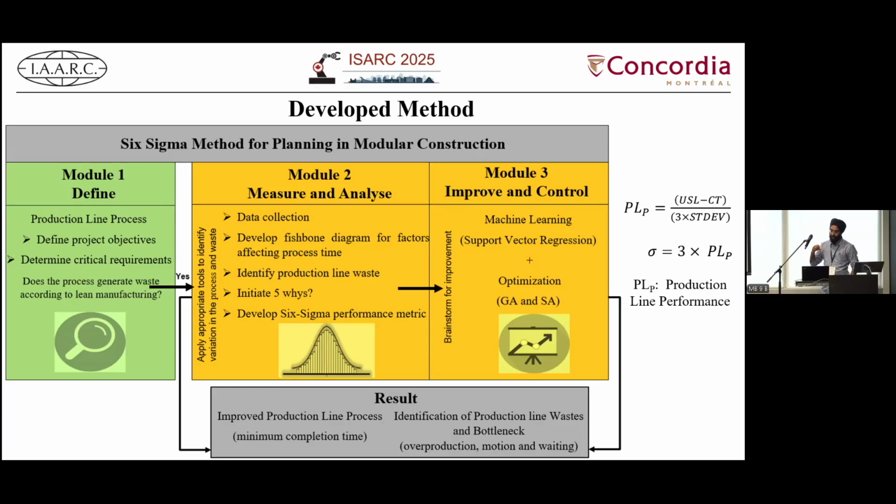The second module is basically about actual completion. Then we try to identify the factors, where the actual completion is a manually computed percentage completion. Probably the most interesting thing, and maybe the justification, is the last one. For the seating area, the production line is supposed to be 100%, but the automation estimated 0%. Basically, this is because the estimation is done using just one image. There is no historic progression of the work, and the concrete work requires reinforcement and everything, which is not visible. It's already done.